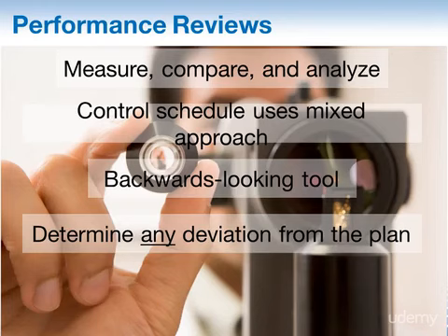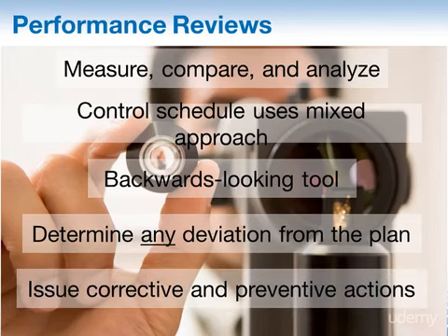Applying this tool to the inputs, in particular the project schedule and the work performance information, helps to determine the following. When was the planned and actual start and finish date of a particular task? What is the variance and how big is it, and how much is there left to do? Having this type of information is what will help you as a project manager to determine whether you need to issue corrective actions or be proactive and issue a preventive action.